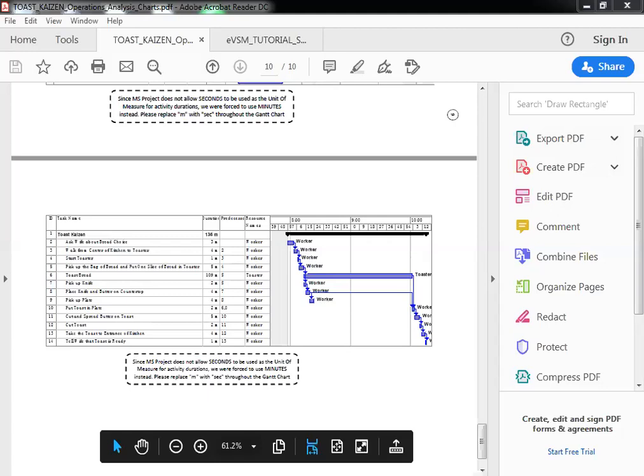All that you have to understand here is that in the Gantt chart, you are taking the flow process chart and every one of the 30 activities is being mapped as a time going from left to right. So every activity occurs between 2 points in time on a timeline which goes left to right, and then every activity is being mapped onto the resources.